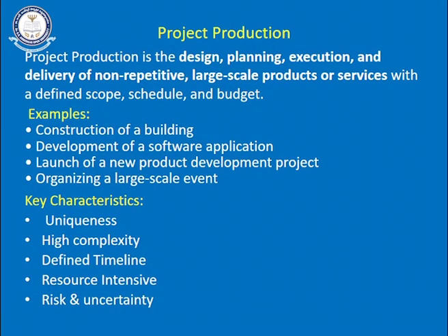Once the small activities are divided, then for each and every activity, what is the starting time and what is the ending time, you need to fix the timelines. You need to estimate the times. How are you going to estimate the time for each activity? Here we take the opinion of the experts, and as per their opinion we fix how much time each and every activity is going to take. And once the activity timings are fixed, then you need to arrange the sequencing order of the activities. What activity should come first, what activity should follow it, and what activity should come last. The logical sequencing order of the activities comes in the fourth stage.